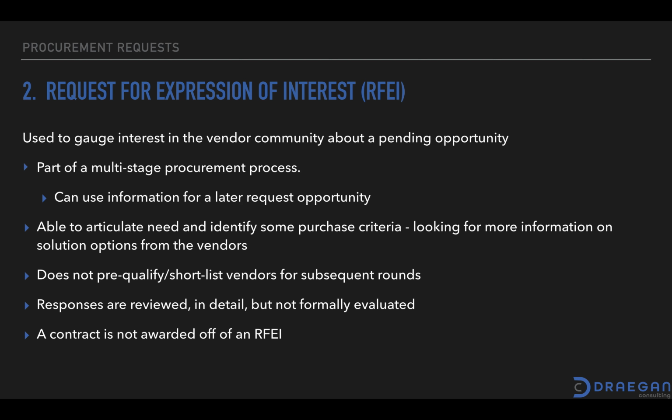It is important to note that this particular cycle doesn't pre-qualify or shortlist vendors. So the responses are reviewed, and they're reviewed in detail, but they're not formally evaluated against one another. So there isn't a shortlist that's created off this process.